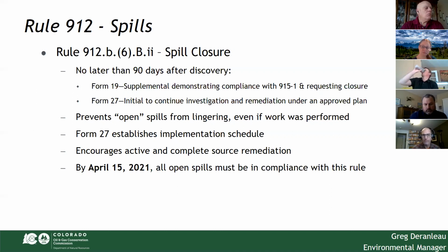And so for all open spills that were active and open prior to January 15th, 2021, when the rules went into place, by April 15th, 90 days after that date, all open spills need to be in compliance with this rule. So we're expecting a Form 19 supplemental or a Form 27 to come in for all those open spills. And we understand that this is a big list, and it's a big lift.